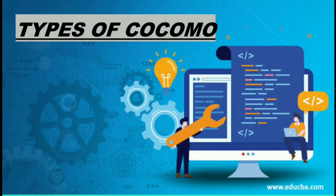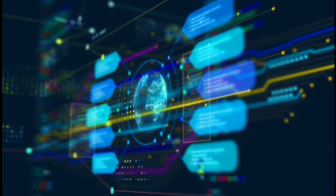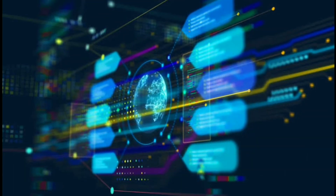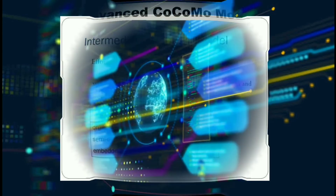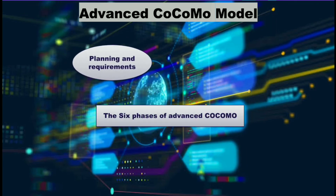There are three types of COCOMO: basic, intermediate, and advanced. Basic COCOMO is suitable for organic, embedded, and semi-detached projects, and calculates software development effort and development time using standard formulas. Intermediate COCOMO computes software development effort as a function of program size and a set of cost drivers that include subjective assessments of products and projects. Advanced COCOMO covers six phases: planning and requirements, system software, complete structure, module cost and test, integration, and test cost.